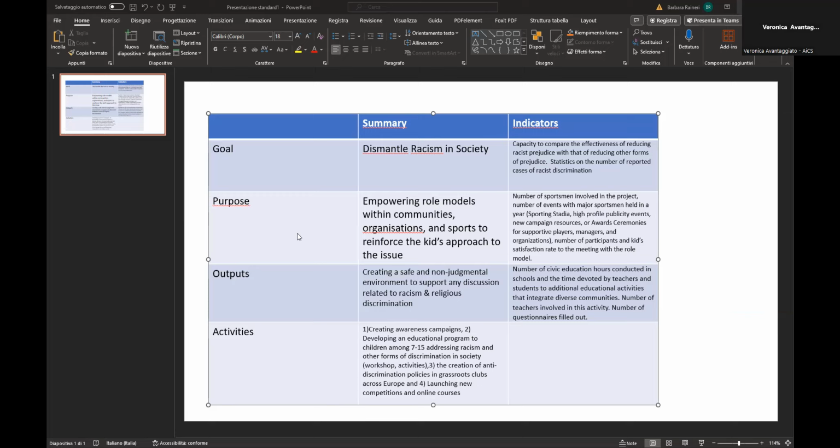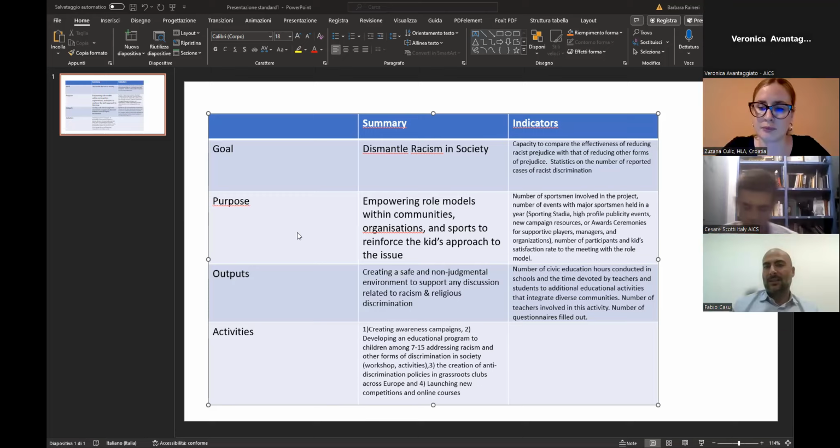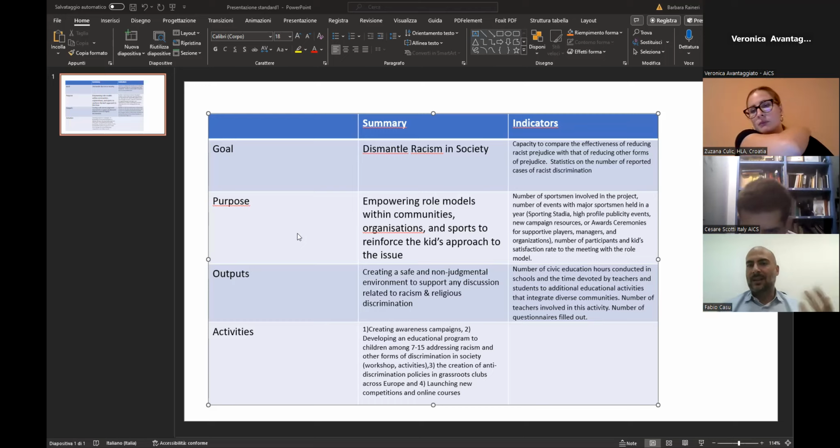So you perform an activity, but there is a risk. And if the risk happens, it's like the assumption, okay? So in the log frame is integration, having Jitsi in my classroom. Assumption, parents do not move their children.